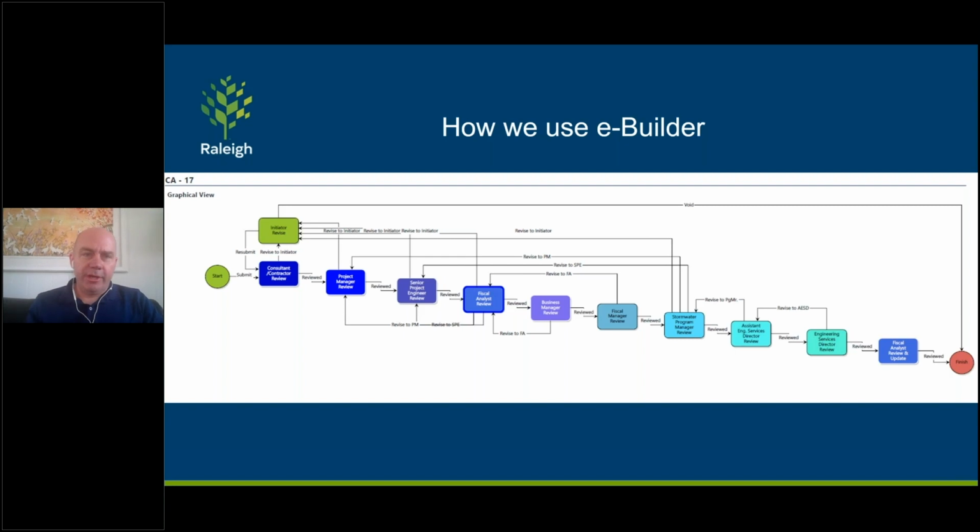And what you're looking at here is a process flow or a workflow. One of the good things about eBuilder is that you don't necessarily have to master the whole system. You don't have to know the ins and outs of all of eBuilder. You really just have to know what your role is and what your part is. So it has this ball in court concept where, based on the step in the workflow, if you're, say, the fiscal manager or fiscal analyst, when that workflow gets to your step, you'll get an email, you'll log in, you'll be on that workflow step, and you'll either approve or add a document or whatever the step requires, or you can reject back to the step before. So it's really just that role, and knowing what you have to do there is much easier than having to learn the whole system.